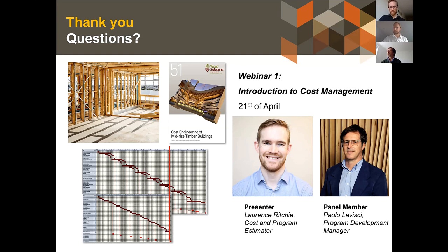The other one I just wanted to clarify was from Charles, who's asking if the 6 to 8 people to install 94 square metres per day includes the installation of vertical elements. Yes, basically. So that includes everything which is on top of the floor element as well, so your load bearing system. So now that they're out of the way, let's see what else there is.